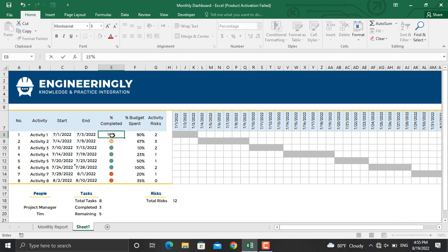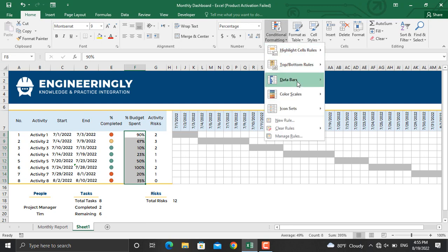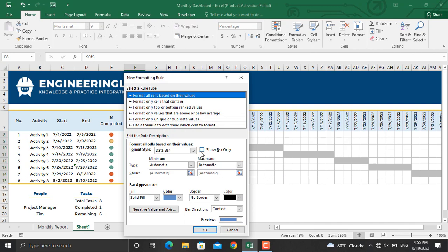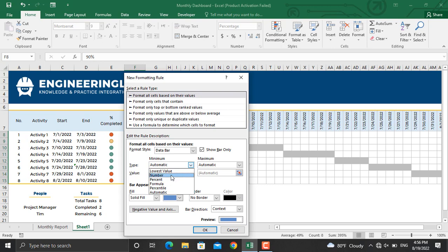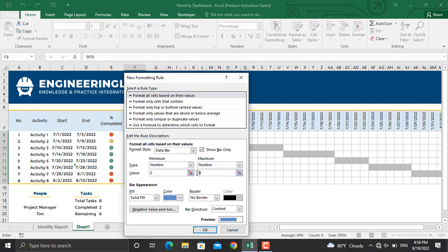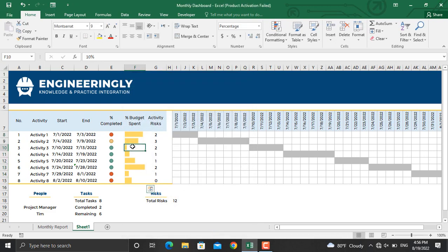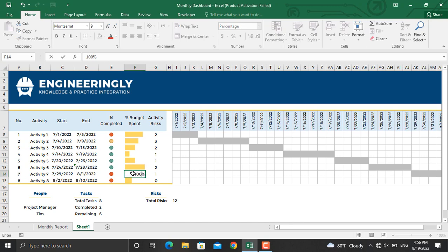For the budget spend, go to Conditional Formatting, then Data Bars, and select More Rules. Show only the data bars without the numbers. From the type select Number — minimum will be zero, maximum will be one (100%). Pick a color, for example this one, and click OK. If I make the budget 50%, the data bars will be updated. At 100% the bar fills completely. That's how you prepare a dynamic project monthly report.